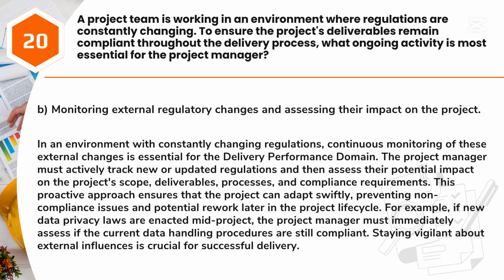This proactive approach ensures that the project can adapt swiftly, preventing non-compliance issues and potential rework later in the project lifecycle. For example, if new data privacy laws are enacted mid-project, the project manager must immediately assess if the current data handling procedures are still compliant. Staying vigilant about external influences is crucial for successful delivery.